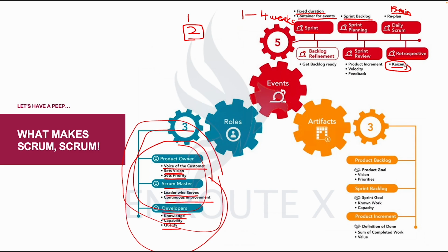And the word Kaizen is a Japanese word for improvement. How should we improve? They are able to spot an actionable item. What can we improve upon? What would then become the story for subsequent sprints as our improvements? So during the retrospective meeting, everyone comes together to look at the last sprint they've just concluded and ask themselves what went well, what did not go well, and how can we improve.